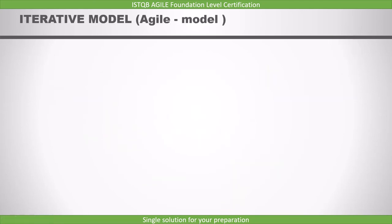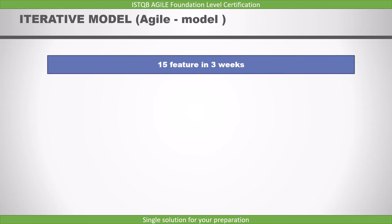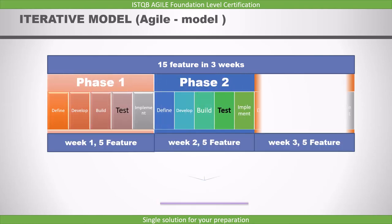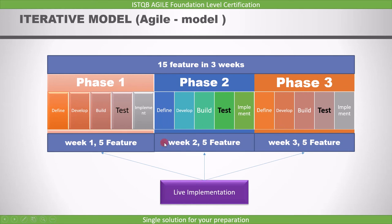Let's see the iterative development model. An example is the Agile model, which is the most popular model in the industry right now. Suppose you have a software that you need to implement in 3 weeks and it has 15 requirements. If you use the Agile model, it will have 3 different phases — each phase will be for 1 week. Since we have to complete the project in 3 weeks, we decide to develop 5 requirements in phase 1, 5 in phase 2, and 5 in phase 3. At the end of 3 weeks, we will have 15 implemented requirements.